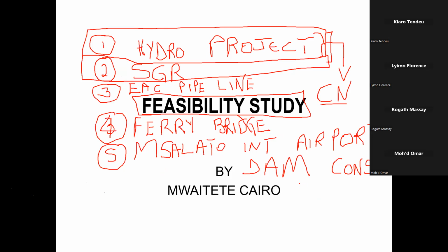Oh, very good. The environmental impact assessment by itself is a component within the feasibility study. Are we together? There is a chapter specifically that demonstrates that you have already carried out the environmental assessment, and the environmental impact assessment report is also attached. So all the information will be attached within. Is that okay? So it is part of the feasibility study? Yes, it is part of it.